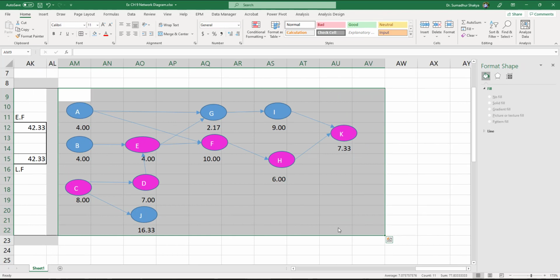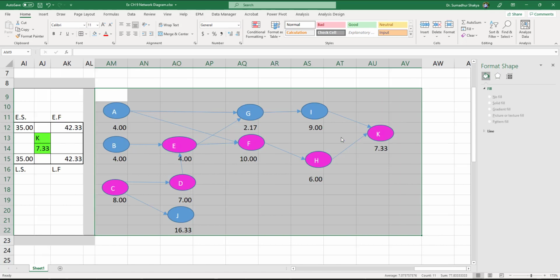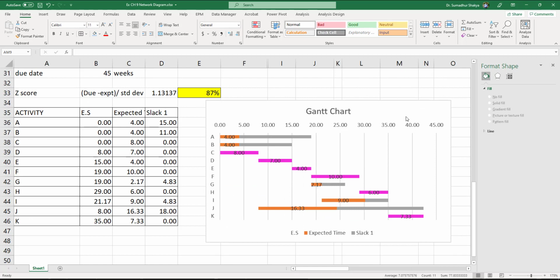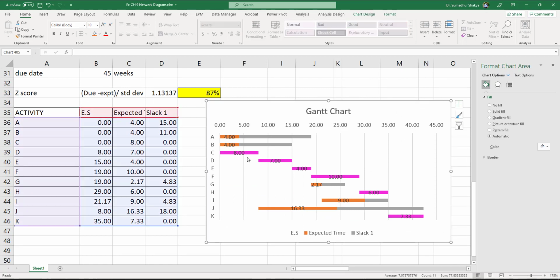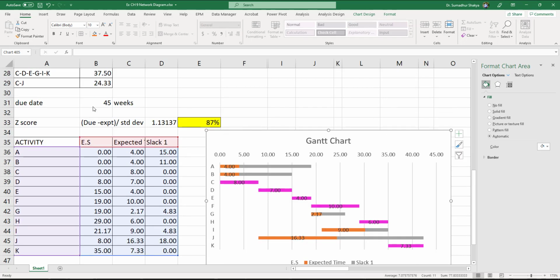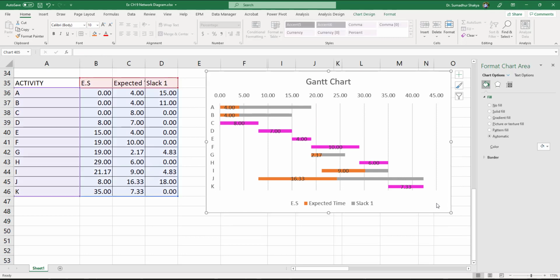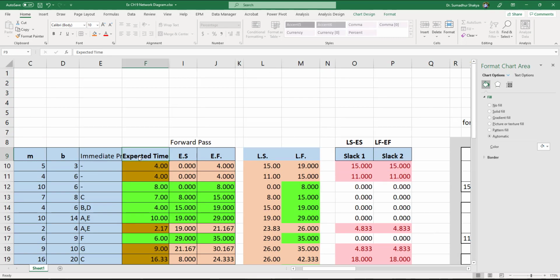Okay, only this much. So the first slide is going to be this one, wherein you'll say out of all the sequence of activities, C, D, E, F, and H, K are the activities that are on the critical path and should not be messed with and cannot get delayed, otherwise it affects the whole project. Or this chart, where you will say the probability of completing this project in certain XYZ number of weeks is this much. So using these two numbers, whatever your deadline is, you're looking at 44 weeks, 46 weeks, or 47 weeks, and the corresponding number that you calculated, and then you show this on a Gantt chart. This is sufficient. You will not show any of these numbers.